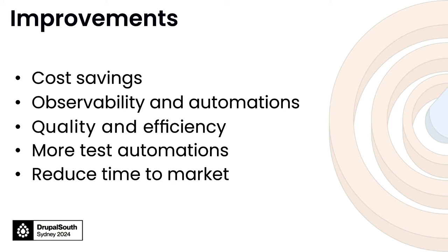We're playing with more automation rules so that when development passes through — a branch is created, it moves the ticket from In Progress; if it's committed, it moves to UAT; and if the build fails, it moves back to In Progress. Our test automation for code standards and linting is still getting set up and not yet linking back to our pipeline. But getting more immediate feedback for developers means the investment in test automation will be well worthwhile, helping reduce reliance on a dedicated test resource and manual regression testing.